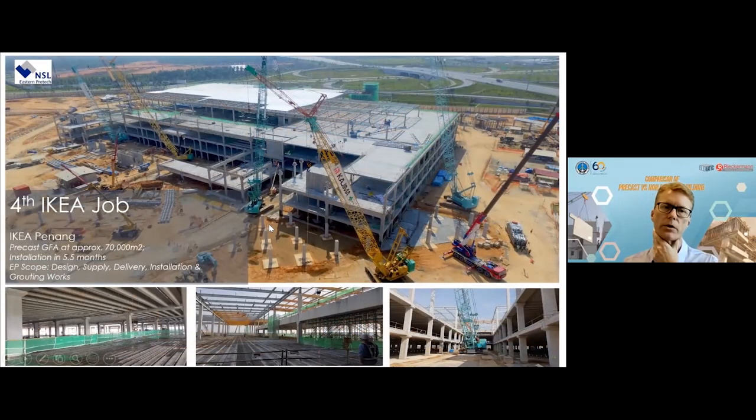This is the fourth one we did just recently in Penang, north of Malaysia. This is where you can see a little bit of the scale of a building and how clean and how neat it is. This is a precast building compared to your cast in situ buildings. By the time this photo was taken, we were approximately 4 months into the construction. We had the final stages here to do, as it mentions here, 5.5 months. 70,000 square meters of built up area in this building.